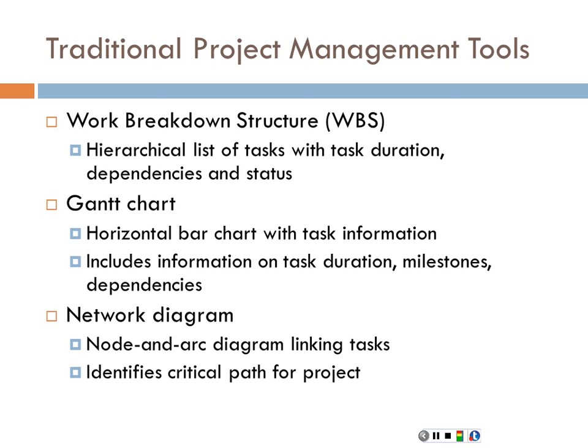And what I suggest with this, we'll see this later on, is to break this down by iteration. Right, so each iteration has been broken down. You have certain deliverables that have been nicely broken down for you for the first iteration, and so you can build that into your timeline. To break this out, say, well, the feasibility analysis is going to be done by whoever, X, Y, and Z, according to this timeline, and so on and so forth.